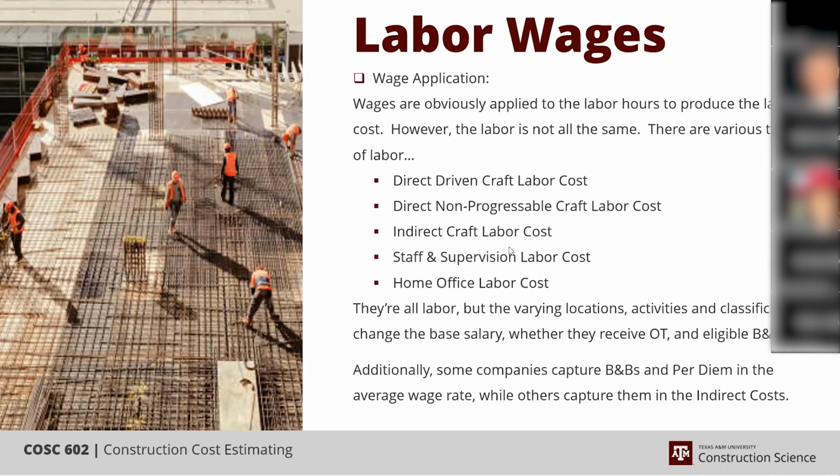They're craft just like the direct craft, but they tend to have a lower journeyman composition. They have more apprentices, or they're less experienced journeymen, so their wage rates tend to be slightly lower, and consequently, they also don't qualify for per diem quite as heavily as the direct craft do.